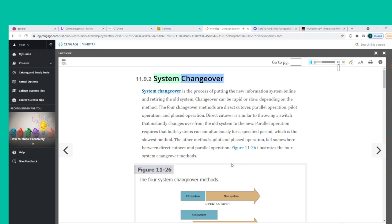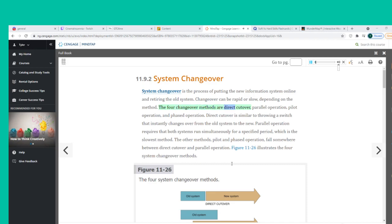System changeover is the process of putting the new information system online and retiring the old system. System changeover can be rapid or slow, depending on the method. The four changeover methods are direct cutover, parallel operation, pilot operation, and phased operation.